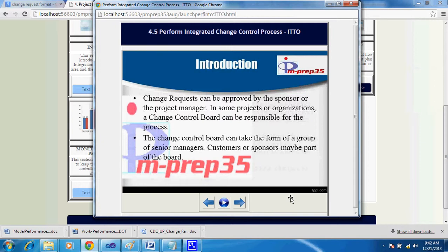So this also needs to be tracked by the change control board, so that they see that the proper statuses or the proper labels have been added to the configuration item, part of the configuration management system. So this is a separate process as such, wherein you might have a configuration management audit, and that again is overseen by the change control board.